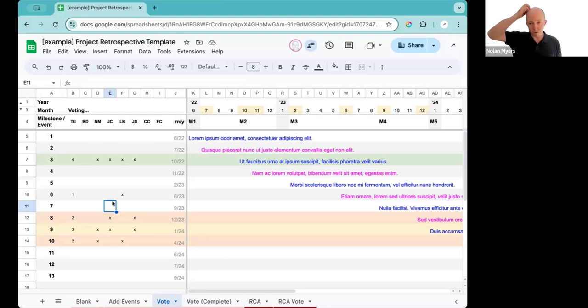Yeah, really important. So what we've typically done is we've asked people to write down their votes before we tally. In the interest of time, we've not made them blind and that other people can't know what the votes are. It doesn't need to be anonymous, but it's blind when you cast the vote so that you don't change your votes. And that's a really important point.